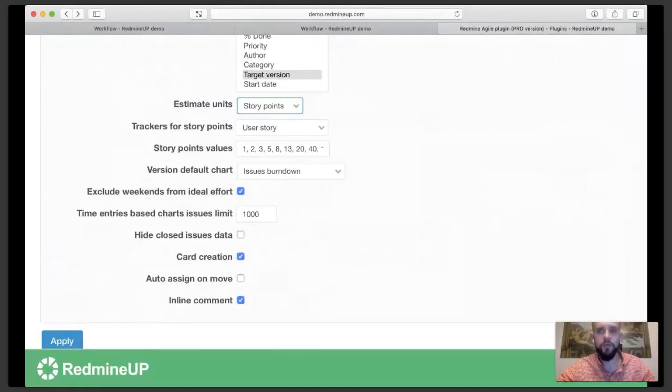This is more abstract. If you plan an issue, let's say you have a task, you plan it. It will take you 2 hours, but this will be planned, for example, by a project manager or senior developer, and then on the go, it will be assigned, for example, to a junior developer, who might need more time to finish the task. Then it won't be a realistic expectation. For example, it might happen that you estimated 2 hours, and your client has the budget calculations for 2 hours of work, but you actually had to spend 5. So either you would lose a lot of money, or your client will be pretty angry that he has to pay double for the items.